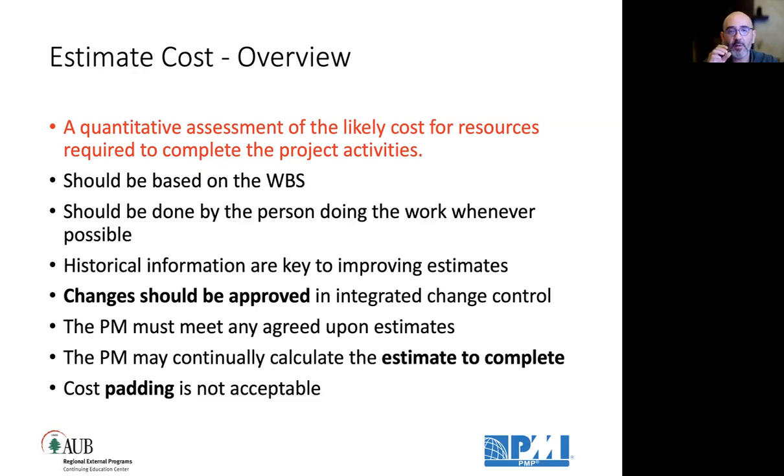So here we are coming up with the resources list and assigning a per-use cost estimate, per-unit-of-time cost estimate, or renting or buying or the depreciation of the resource that we are going to buy, and giving an estimate in dollar amount to this resource. When we allocate that resource to a specific activity, automatically the cost of usage applies. Meaning if a day costs $1000 and we put it on an activity of 5 days, this activity will already cost us $5000, the cost of assigning this resource.